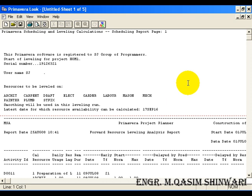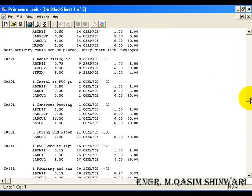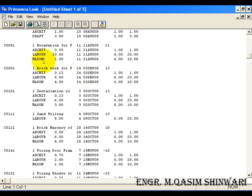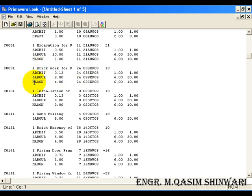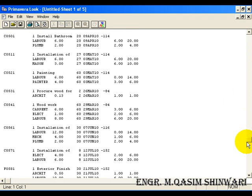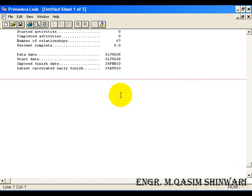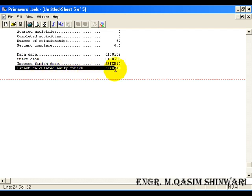Here you can see the use of the different resources are shown. It is the activity ID and this is the description. Then architect, labor, mason and early start date and so on. Now coming to this, you can see that if we are using the current resources, we are getting the 25th I guess 2010 date.